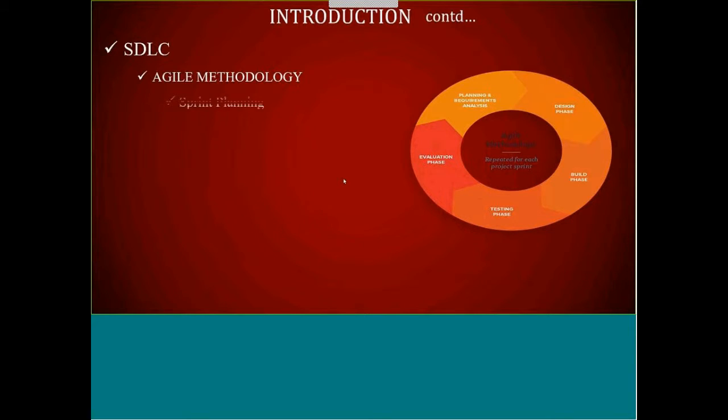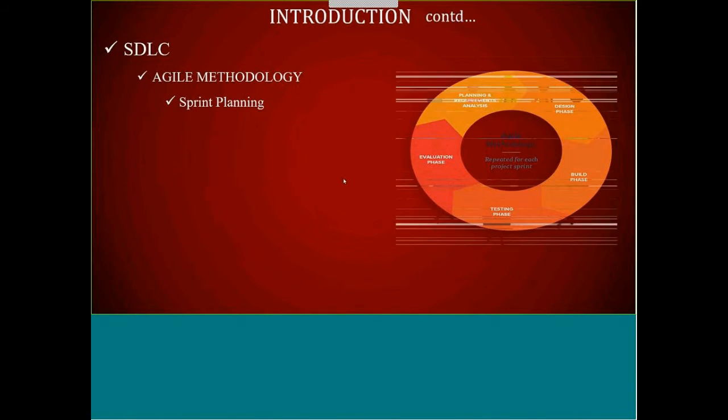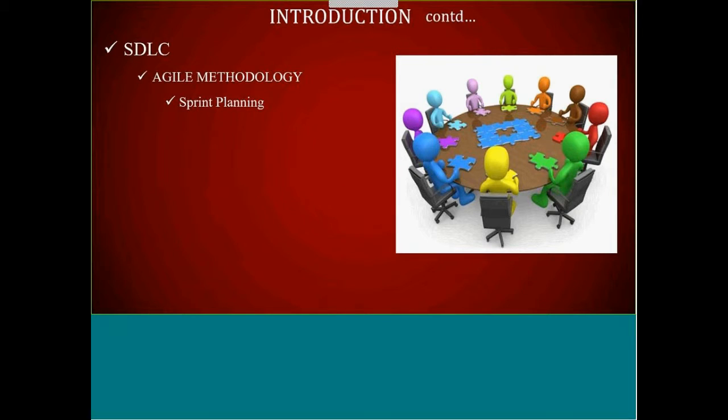And in our example on March 18th, we have something called sprint planning, wherein everyone in the team, see, if you are able to see, there are different actors, like these 3 may be developers, these 2 may be QA, this guy may be a UI team, and these 2 guys may be a UX team, and he would be the PO. Just randomly I've taken this. So this is called a sprint planning meeting, which happens on the very first day of each sprint. Okay, in our example it is on March 18th, 2009.